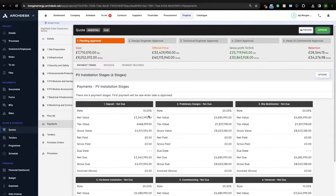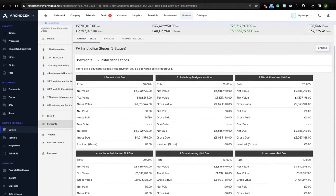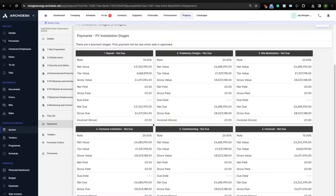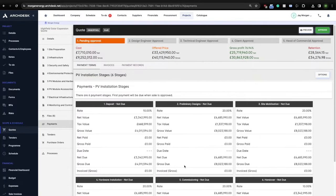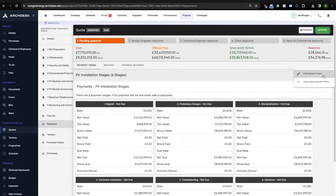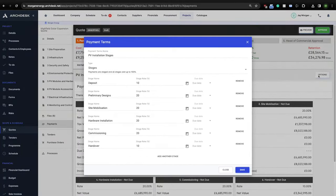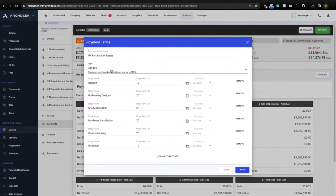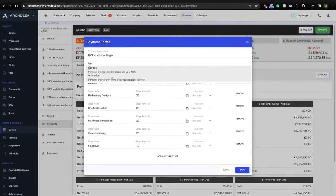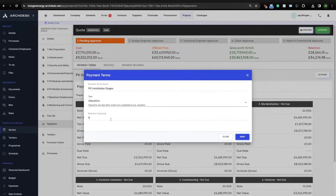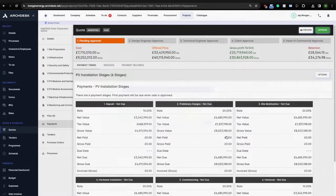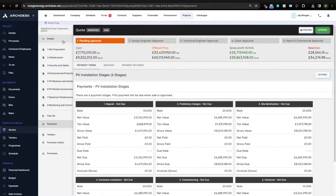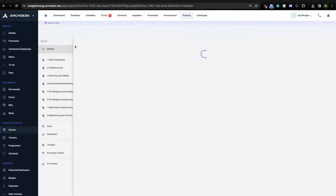Each quote has its own files section where you can upload any other necessary documentation that will be shared as part of it. You can also agree on the various payment terms. ArcDesk supports two payment systems, a staged payment or an application of payment or sometimes called valuations. Here you can see we are proposing six payment stages upon completion of each milestone. You can easily change payment terms to one of the previously templated terms. Valuation systems are a little more advanced. ArcDesk will support you with generating reports, for example, every month with the completion status of the works. Upon approval of the application, you can issue invoices directly from ArcDesk.